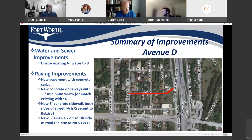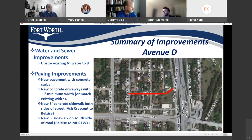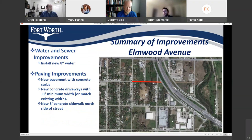On Avenue D, we'll be upsizing the existing 6-inch water to an 8-inch. New pavement, new concrete curbs, new concrete driveways, new concrete sidewalks on both sides of the street from Ash Crescent to Bellezee's, and then a new 5-foot sidewalk on the south side of the road from Bellezee's to MLK Freeway. On Elmwood, we'll be installing a new 8-inch waterline, new pavement, new concrete curbs and gutters, new concrete driveways, and new concrete sidewalk on the north side of the street.